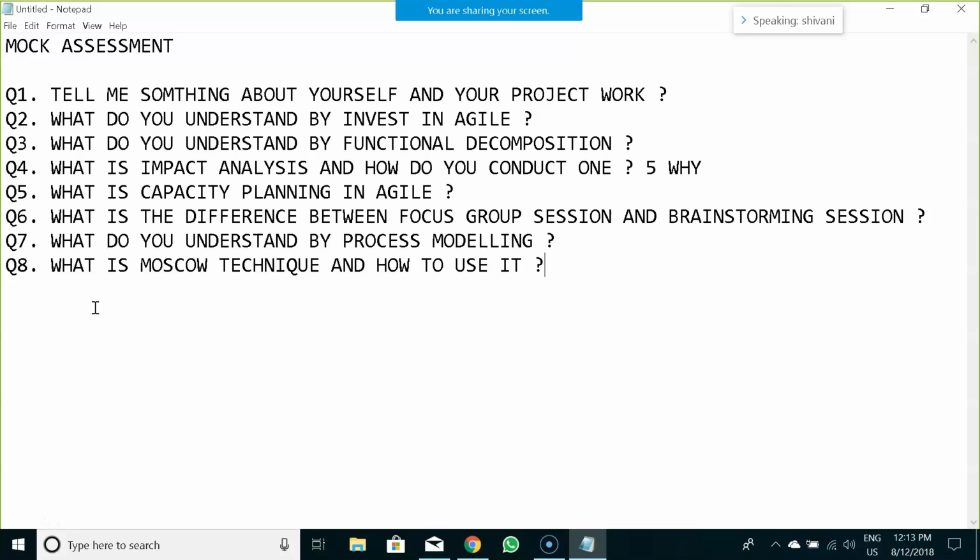Suppose there is a user story in which there are features. The feature which is on top priority, which is to be done with immediate response, we put that user story in the must-have category. Whatever is required for the project, but has lower priority, and is critical for the system to be included, goes in the should-have category.